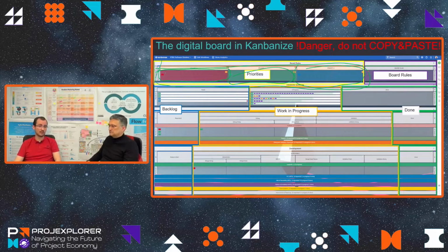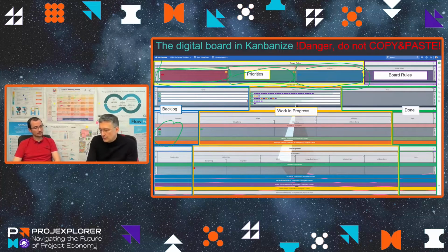When you have the priorities on top, you just look at the priority and say, oh yes, this is according to the first priority, and I should take it first after that. Yeah, and that's the replenishment. Actually, what happens is when you finish a task and you have capacity to start a new task, you look at the backlog for a request that corresponds to priority 1. If there is such a request, you pull it immediately after. We do not need to ask the senior manager, should I start it?